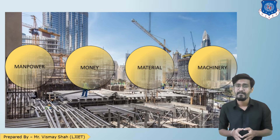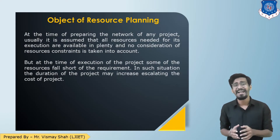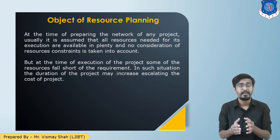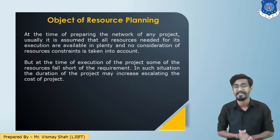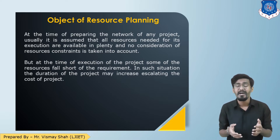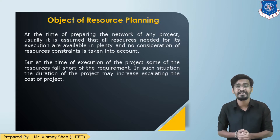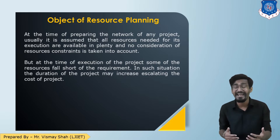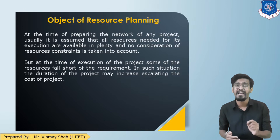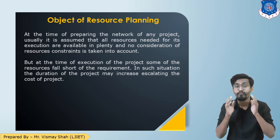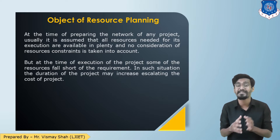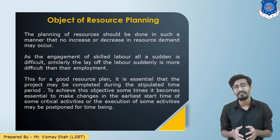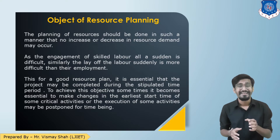The objectives of resource planning: at the time of preparing the network, we assume that the resources required to perform each activity will be available in ample amounts. But in the real-time scenario that may not be true. It may happen that you fall short on resources, and falling short on resources will cause a delay in your project, and that delay will cost you extra.